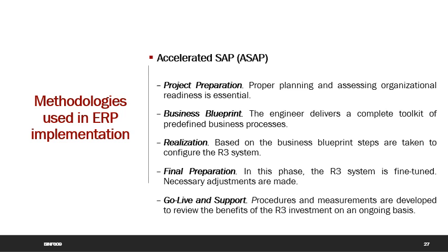ASAP provides examples, checklists, or templates such as a cutover plan. They are used as a starting point to avoid reinventing the wheel. ASAP calls these kits accelerators.